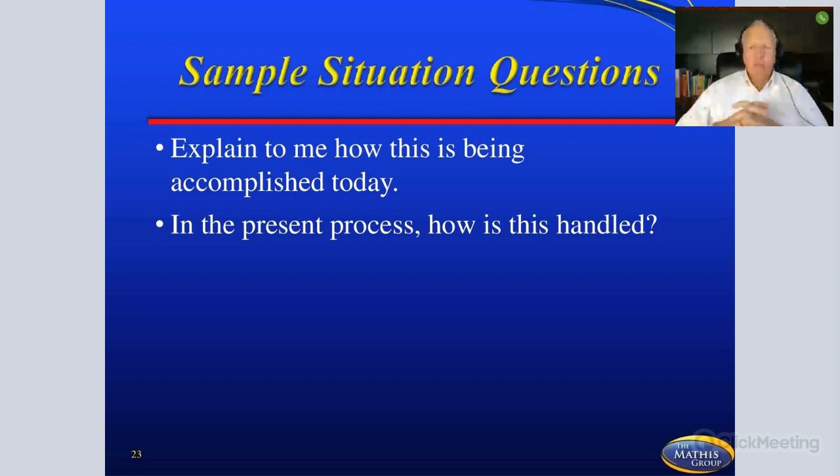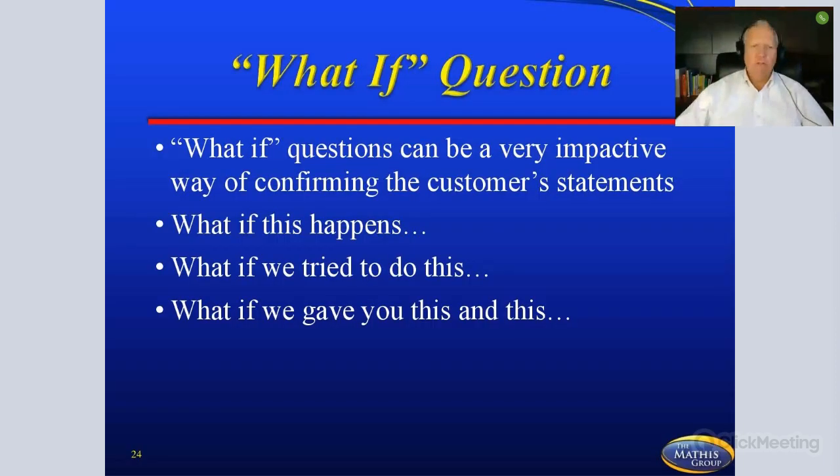I hear it from many of you all the time in class. The customer comes in and says, here's how we're doing it, but we want it automated. But if it's a terrible process, all you're doing is automating a bad process that's taking 30 days to get through. So you want to look at the process and streamline it, and then if automation makes sense, automate something that is going to help that customer and make sense to them.